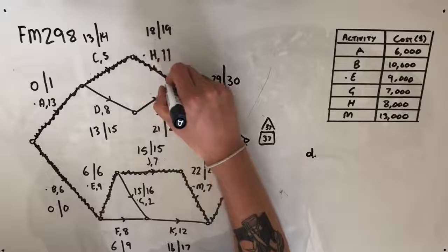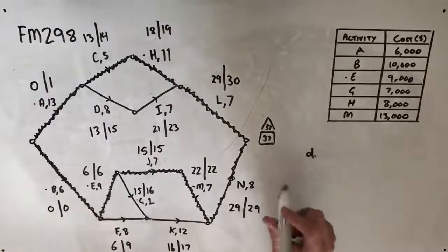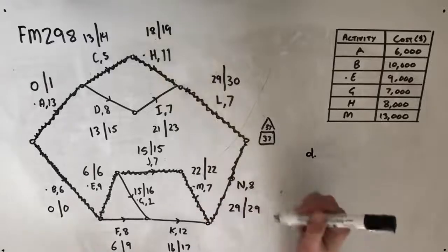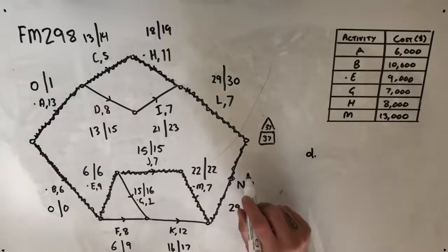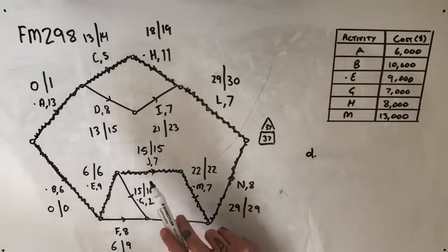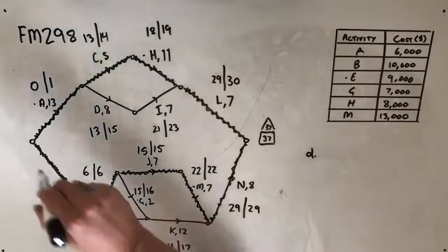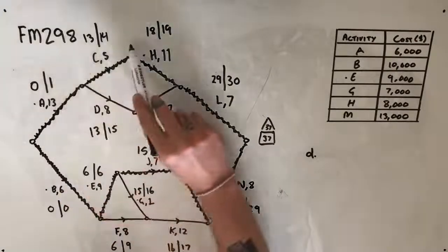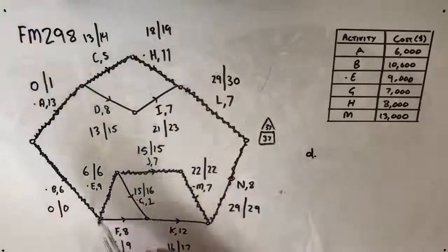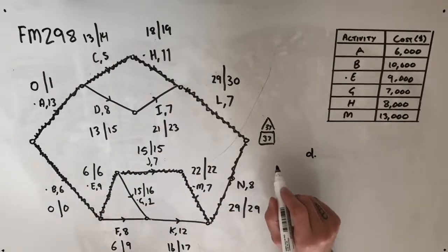So these guys along here are now also on the critical path at this stage. So now what I want to look at is, can I reduce this any further? Can I reduce by another whole day? If I can reduce one activity that's on this critical path and another activity that's on this critical path, I can create another day of reductions.